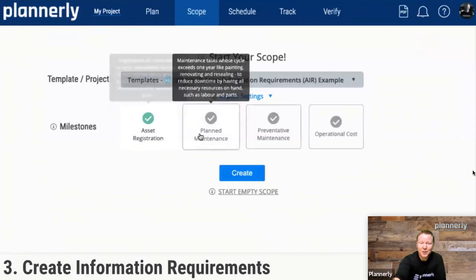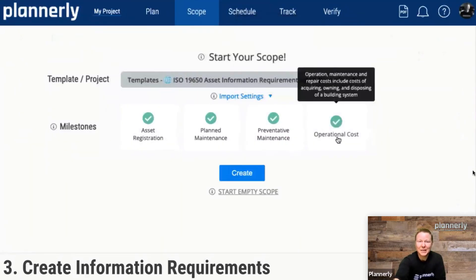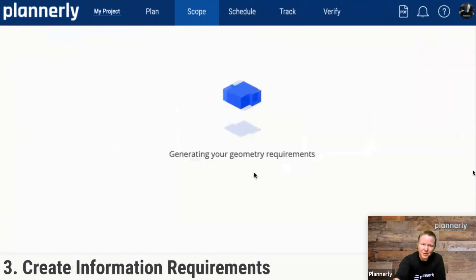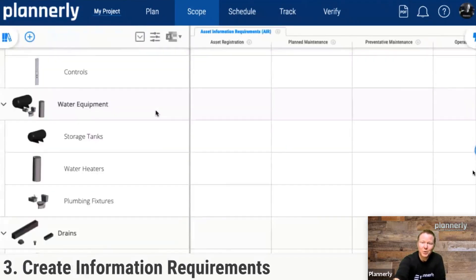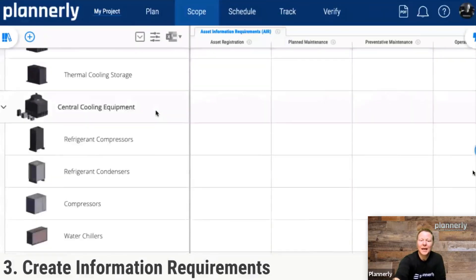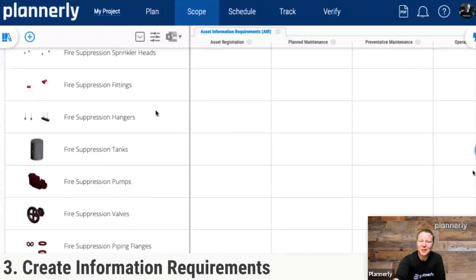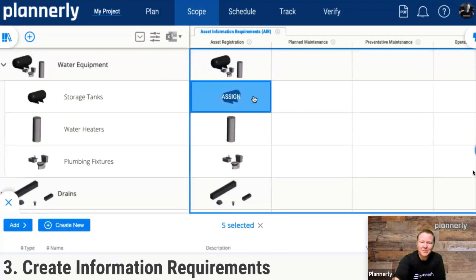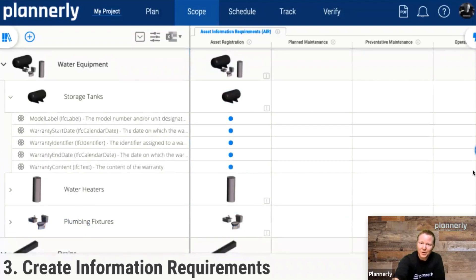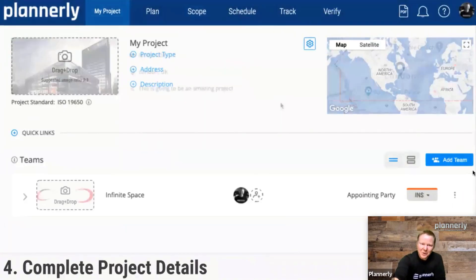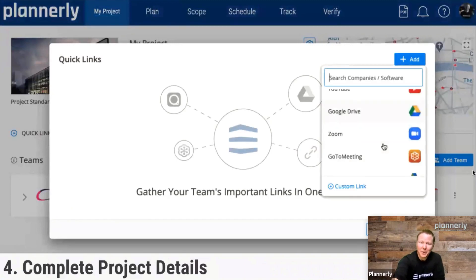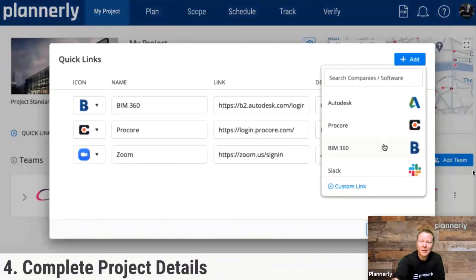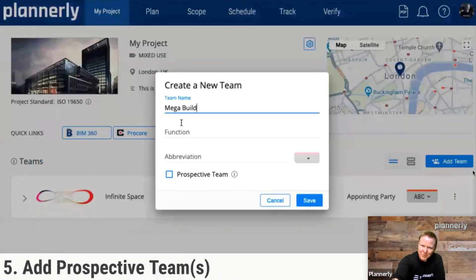On the scoping side of things, the first thing from an employer's perspective, or an appointing party, they're going to be interested in the assets. So they would have a register of assets that they would put the asset information requirements into — a long list of assets they would want to add information requirements for certain uses, whether it's planned maintenance, preventative maintenance, etc. By assigning even down to the information requirements, we're able to track that, and then we would want to tell teams where to find certain information. On a dashboard, we can simply provide access to all of those different sources of information and add the prospective teams to that workflow.